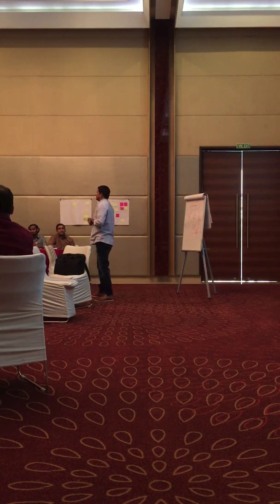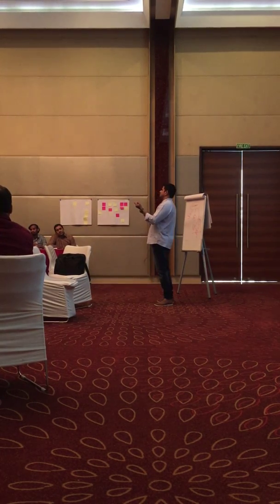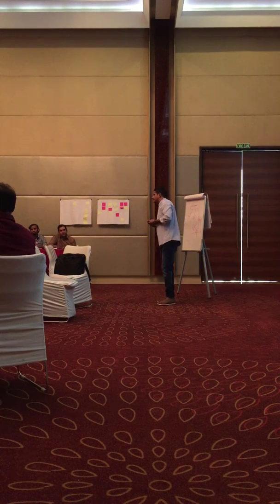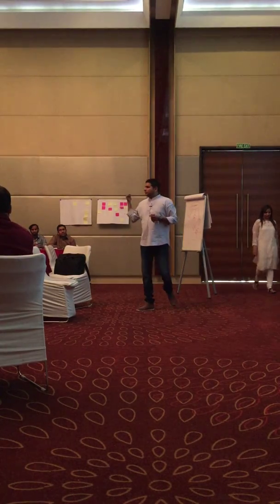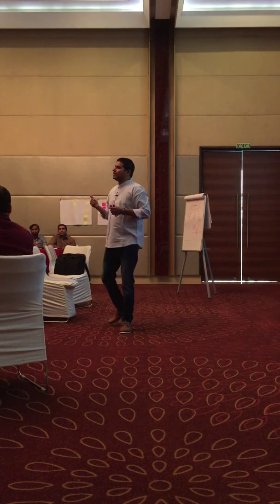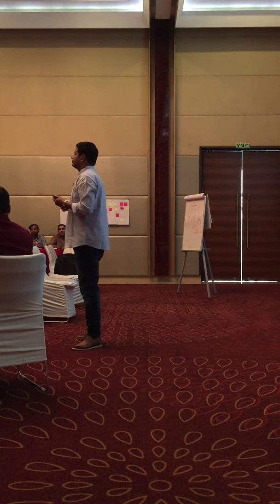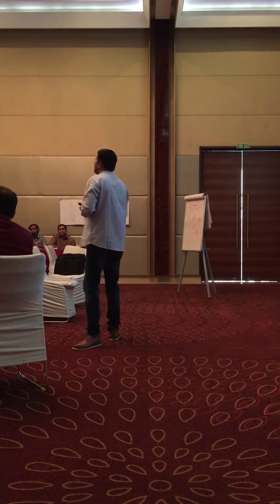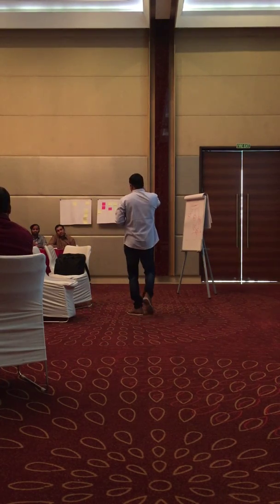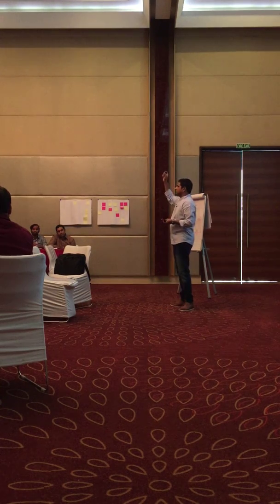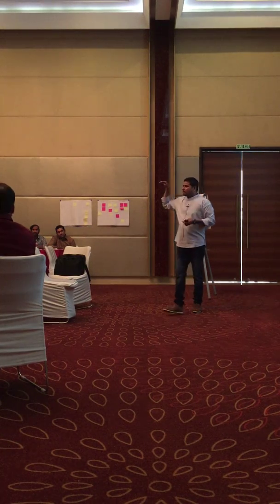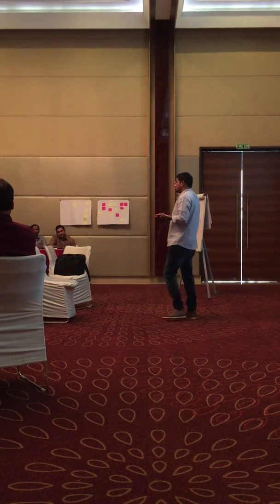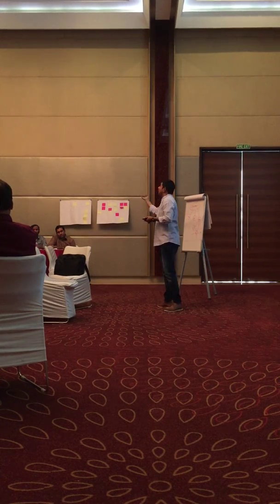There's nothing mandatory. It is up to you to decide. The question is, are there any mandatory fields for a particular product backlog? The fields that you can consider with the product backlog are ID and rank, that means the sort order, and the description. Any dependency, upstream dependency or downstream dependency, any acceptance criteria, which release it belongs to, which sprint it belongs to, and estimate of the story size.